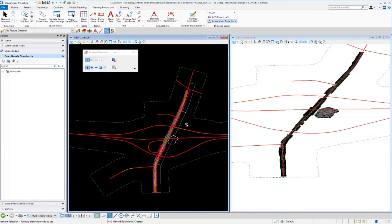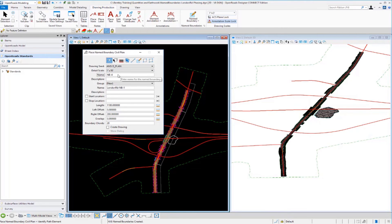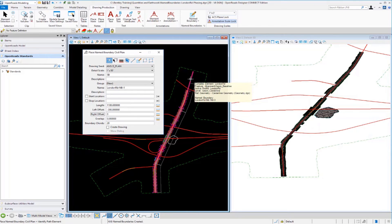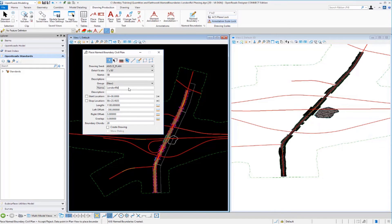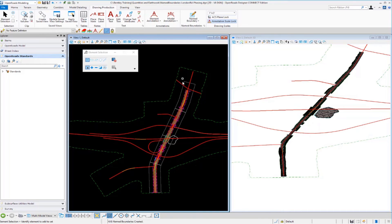Using the same procedure for the southbound named boundary: opening the Named Boundary tool, entering SB in the name field, keeping the same length, setting the left offset to negative 200 (since southbound is on the left side), and the right offset to zero. Identifying the alignment, dragging the cursor from the beginning to create four named boundary shapes, data-pointing to accept, then keying in SB for southbound in the name field and pressing Tab creates those southbound named boundaries.